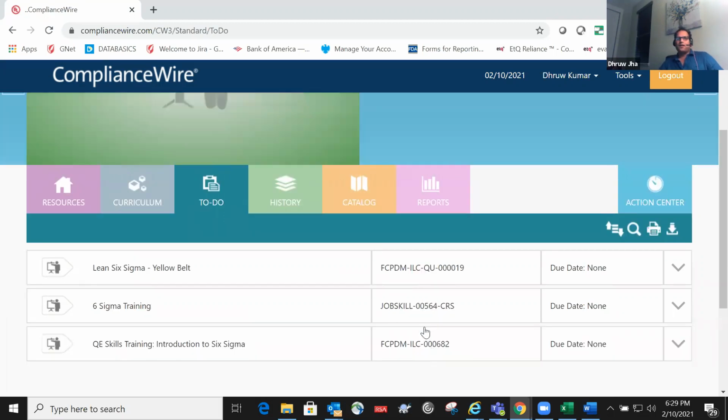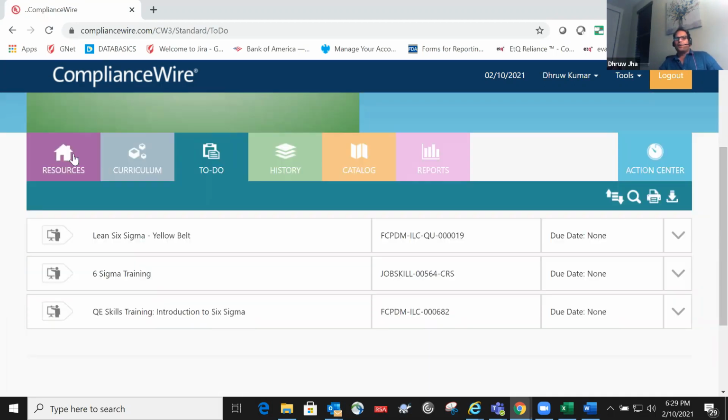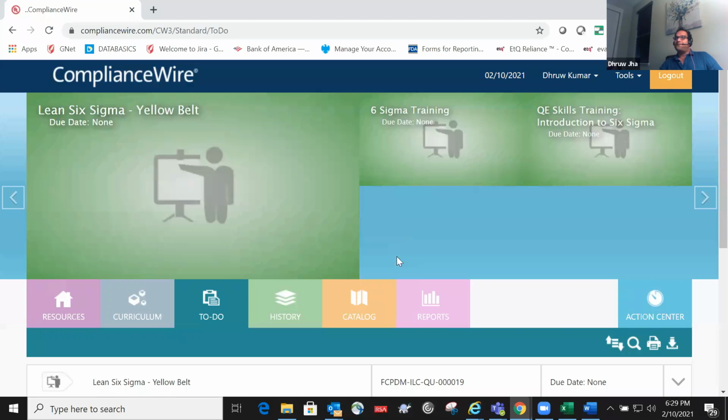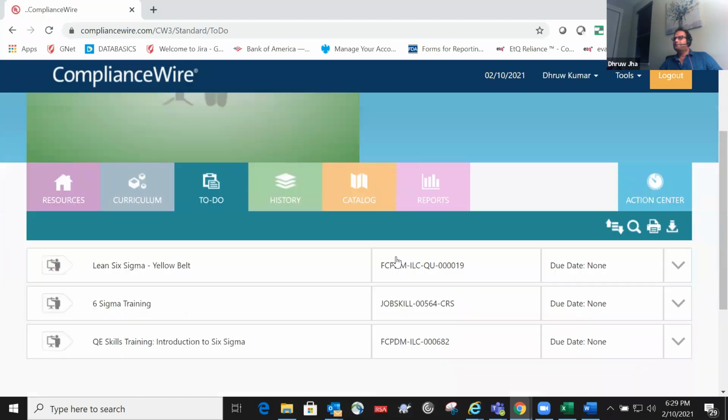Based on that, these are modules. You can define any module: to-do, history, catalog, report. Each module will take 3 to 5 months for one person to test and write tests, sometimes more. Just this system, a very simple system, can take more than 1.5 years to validate for 15 validation engineers. Think about it.